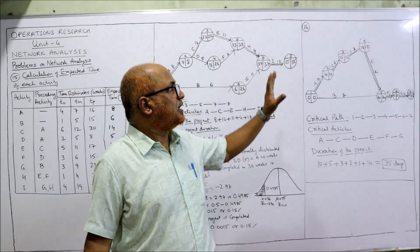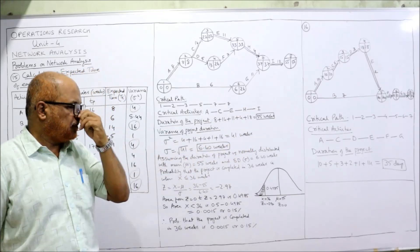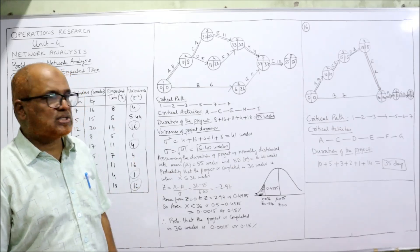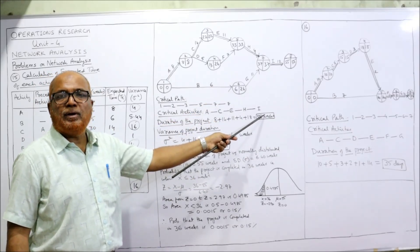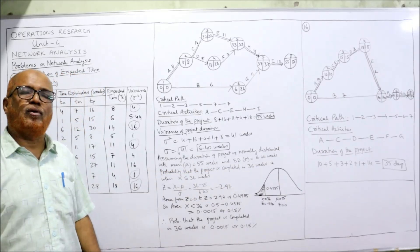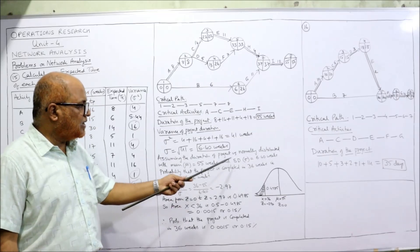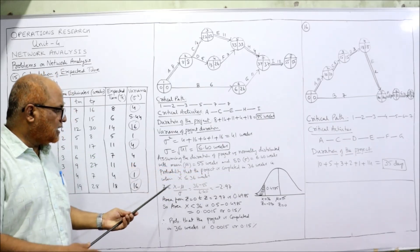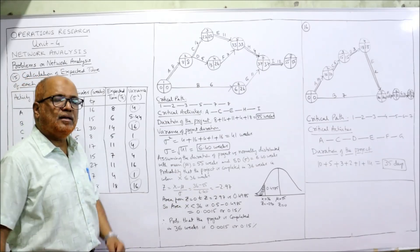We have calculated EST, LFT, critical path, duration, and variance. Now the question asks: what is the probability that the project will be completed in 36 weeks? The expected time is 55 weeks, but we want the probability it finishes in 36 weeks. We assume the project duration follows a normal distribution where μ = 55 weeks and σ = 6.4 weeks. Our X value is 36. So Z = (X − μ) / σ = (36 − 55) / 6.4 = −2.97.